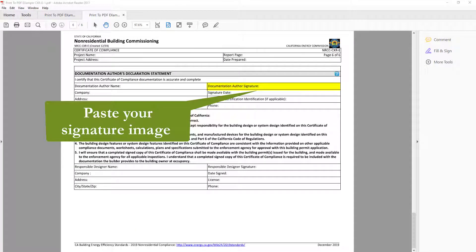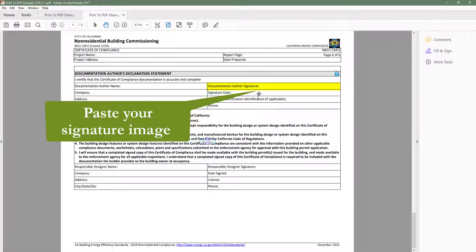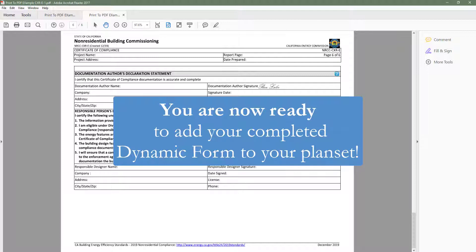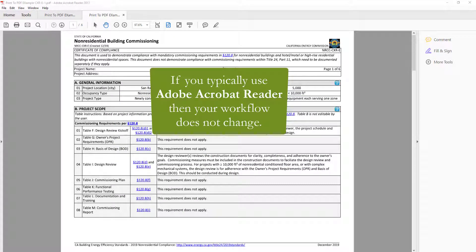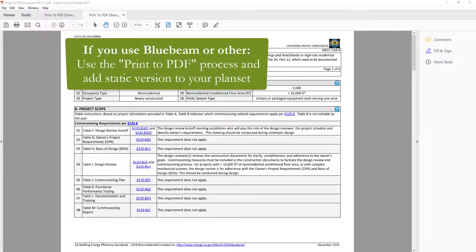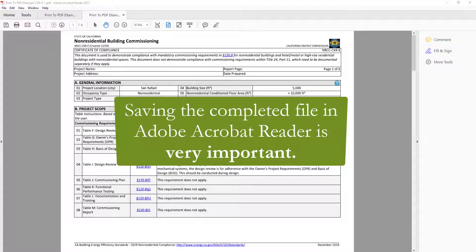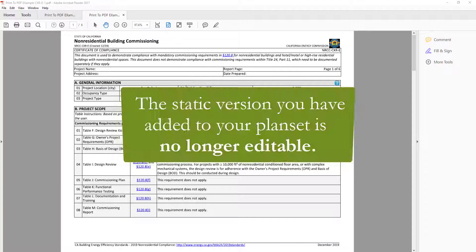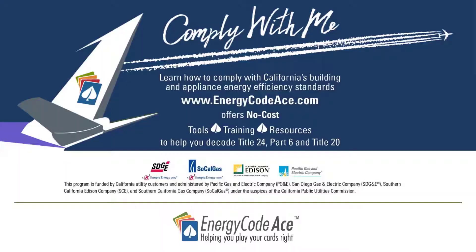When you have your static form open, you can paste an image of your signature onto the PDF. Once you have completed those three checks and reviewed your report for accuracy, you are now ready to add this form to your plan set. If you typically use Adobe Acrobat Reader to create and store your project documents, your workflow does not change. If you use Bluebeam or another PDF reading software, you will need to follow the Print to PDF process and add the static version to your plan set. Saving the completed file in Adobe Acrobat Reader is very important — without this file, you will not be able to go back and make edits to the form, as the static version added to your plan set will no longer be editable.